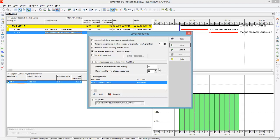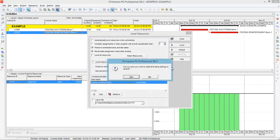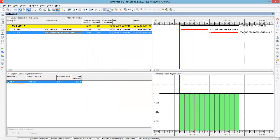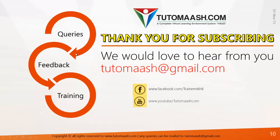So that's it — the leveling has been done using the automatic method. If you want to go back to the previous state, click on level resource, select default, click yes, then level and schedule, and the program will return to its previous position. This is why I recommend not using automatic leveling options. Always try the manual leveling techniques such as delaying, splitting, crunching, and stretching. I'll explain how to apply these options in Primavera in the expert series. Thanks for watching this session — I really hope you understand how resource leveling works in Primavera.